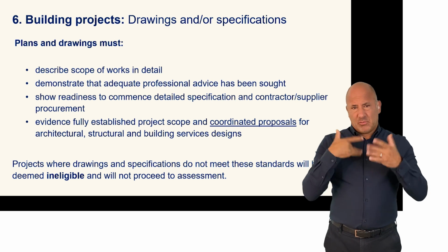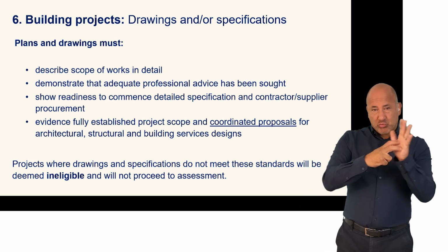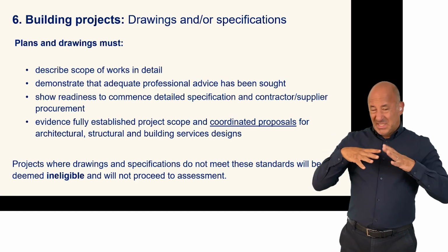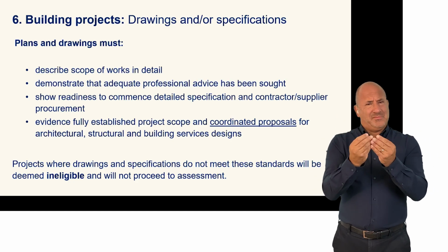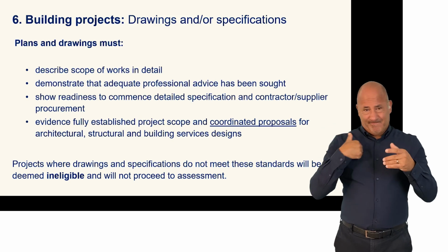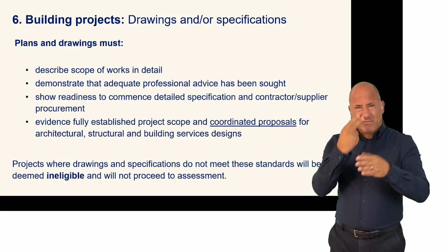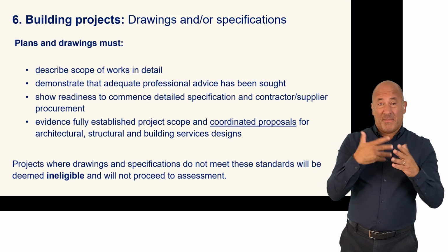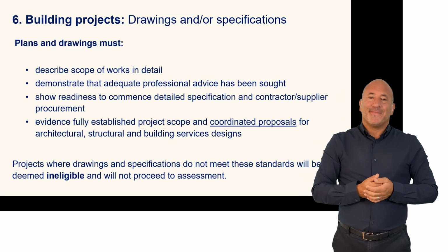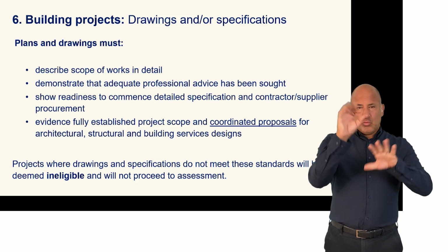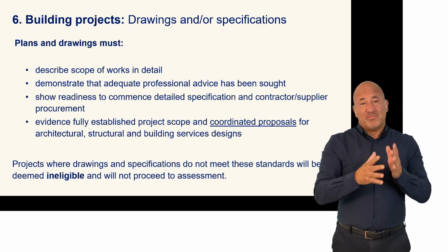They should demonstrate they are ready to commence detailed specification and contractor or supplier procurement work if the funding is confirmed, and they should show that the project scope is fully established, including demonstrating coordinated proposals for architectural, structural, and building services designs. If relevant, specify key materials and products as well. Projects where drawings and specifications do not meet these standards will be deemed ineligible and will not proceed to assessment.